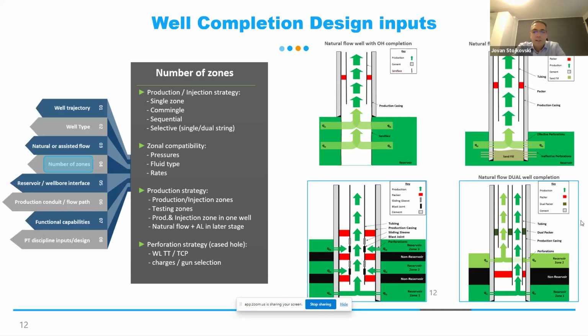In some cases, a workover can cost really a lot, in some countries where workover rigs are not available and you need to book them a year in advance. Or if you are lucky to have your own workover crews which can execute those jobs, then you will pay significantly less for those.